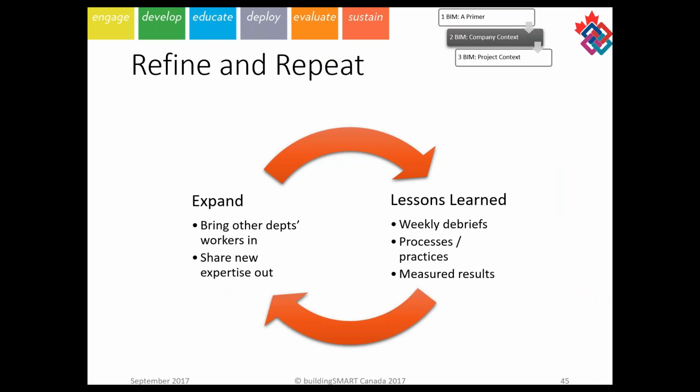So what this is all about is a theme of incremental, rolled-out implementation. What we want to see is starting with one project, one team, one department. You want to learn from it, refine, reapply, and later spread it throughout the company. Hence, training and rollout is not a one-off effort. It is something you're going to come back to time and time again as you progressively implement BIM through your firm. At this point in time, I'll hand it back to Paul, who will finish off.